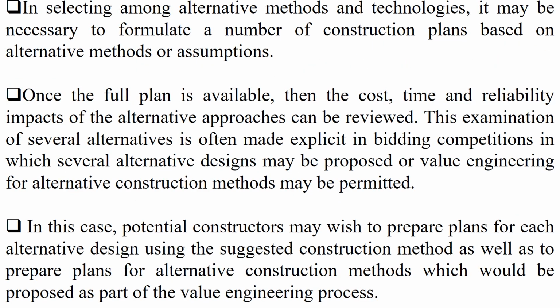With alternative methods and technologies, it may be necessary to formulate a number of construction plans based on the alternate methods or assumptions. Assumptions, whatever we are making, must have a logic or some base in practical application. Once the full plan is available, then the cost, time and reliability impacts of the alternative approaches can be reviewed. This examination of several alternatives is often made explicit in bidding competitions, in which several alternative designs may be proposed or value engineering for alternative construction methods may be permitted.